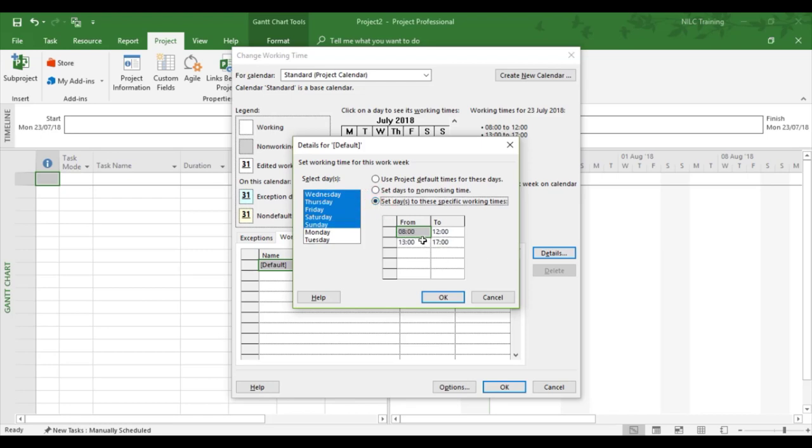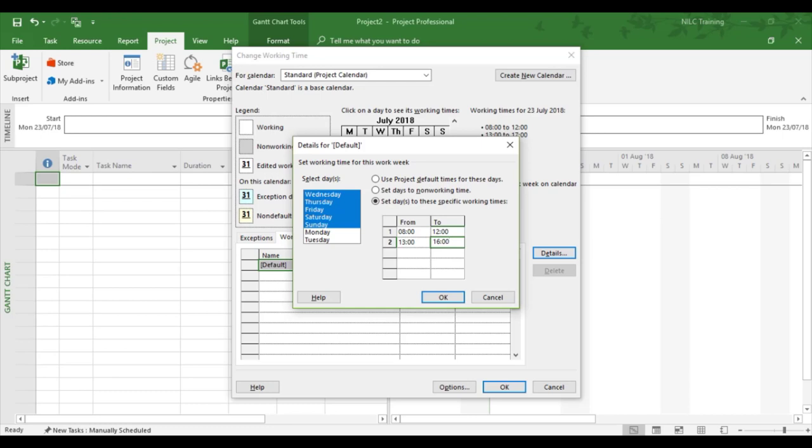Now I'm just going to give it an hour earlier finish, so I'm going to leave it 8 to 12 for four hours, and then it's going to be 1 to... I'm going to take away the 17 and I'm going to make it 16:00.